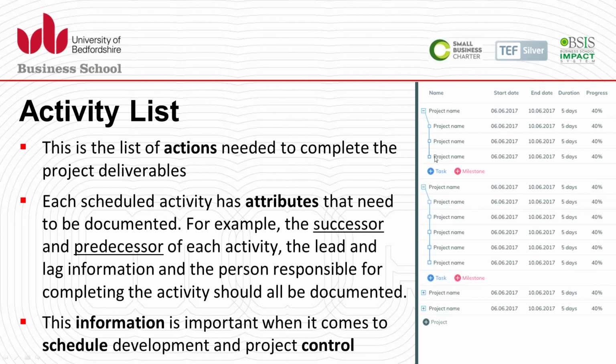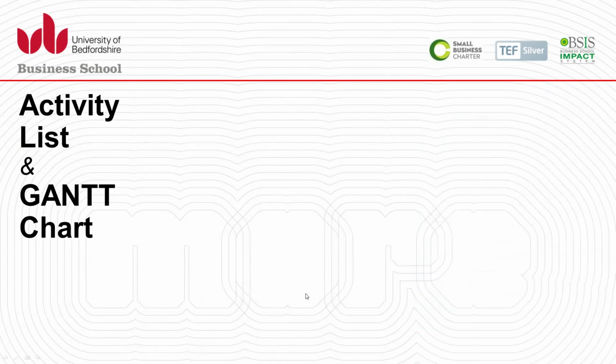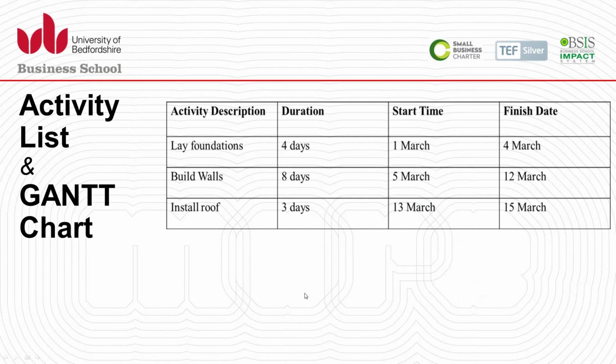So we have the complete list of activities, and each activity has a numeric or alphabetical coding, and we know the time or the duration for each activity to be completed. Then during execution, what has been planned during the planning phase is the baseline, and we compare it with how much time is actually spent and how much work has progressed or already been achieved. So that is very important, tracking of the progress.